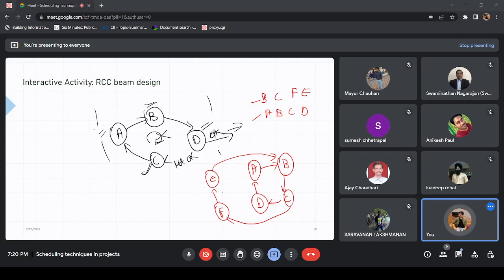So now, where would you like to assume, or which parameter do you have more confidence in? In the beam design example, we assumed the material properties and the beam size. Why? Because we were more confident about it. We have been doing it for long. So similarly, if you have such information, you go for that tear that you can remove with a lot of confidence, or it doesn't matter much.